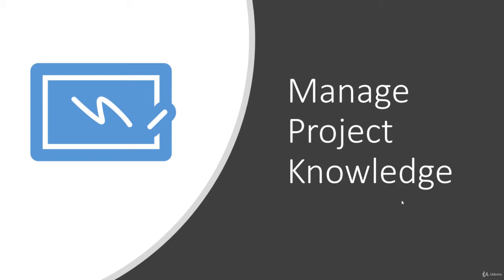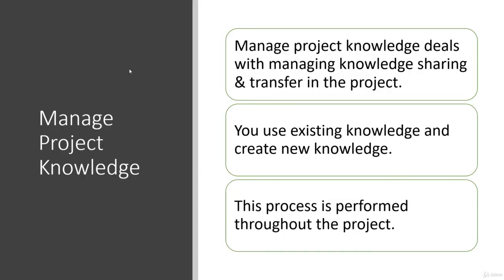Manage Project Knowledge is basically about managing knowledge. You are going to use existing knowledge — all the documents you have, organizational process assets — as your starting point for document analysis. As you progress with the project, you create more knowledge, and everything is captured in the form of documents. As a project manager, you are responsible for making sure all knowledge and information is well documented and captured, because that becomes seed information for the next project.